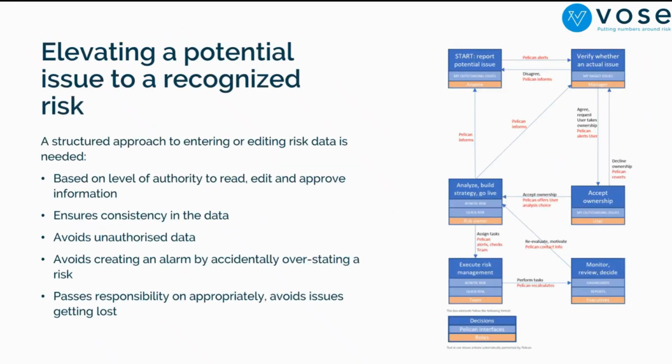The Pelican is also offering the users customization in terms of organizing the process of risk management, so that there's a structured approach to entering and editing risks. It starts with the potential issue, then it's verified by a designated person, and then someone accepts ownership of that risk, and then it goes into evaluation.